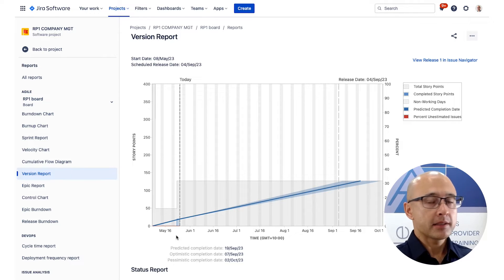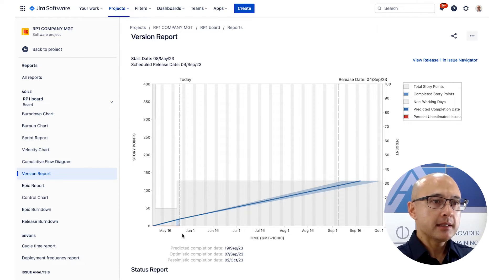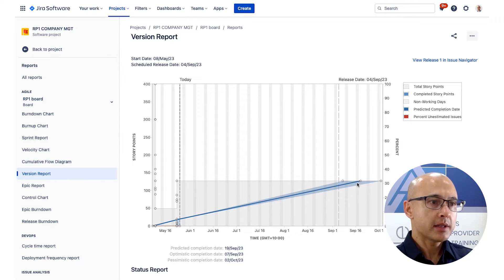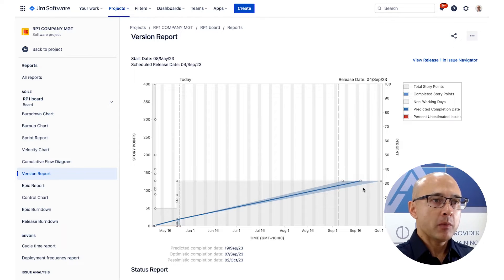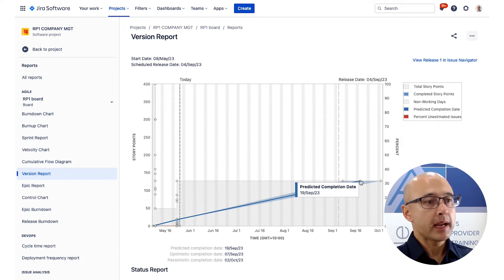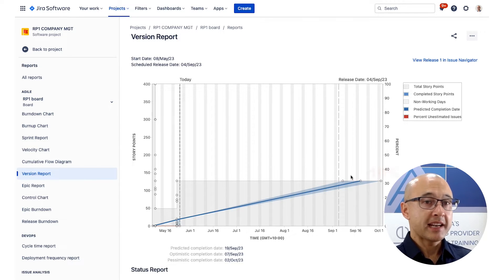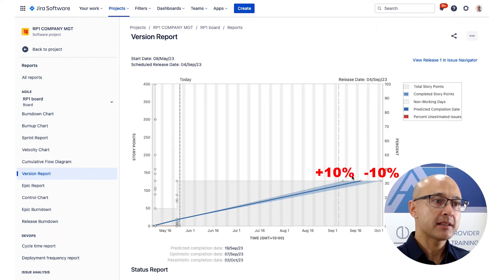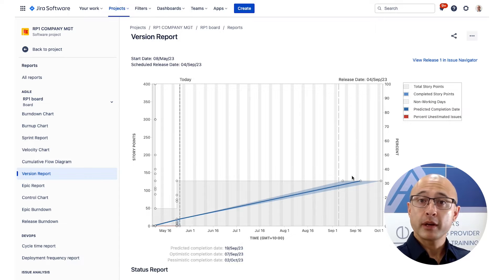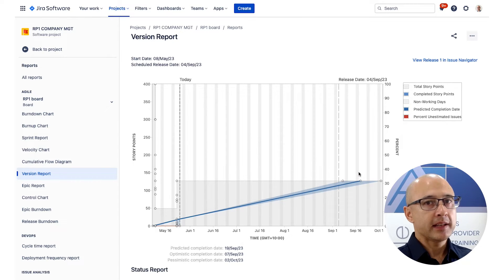We can also see non-working days, such as weekends, presented as gray on the chart. We can see a predicted completion date as the blue line — hovering over that dot it's predicting completion on the 19th of September. It shows not just a predicted date but also an optimistic and a pessimistic date. It calculates those by taking 10% off your velocity for the pessimistic date and adding 10% for the optimistic date. What it's telling you is your scheduled release should ideally fall somewhere within that range.